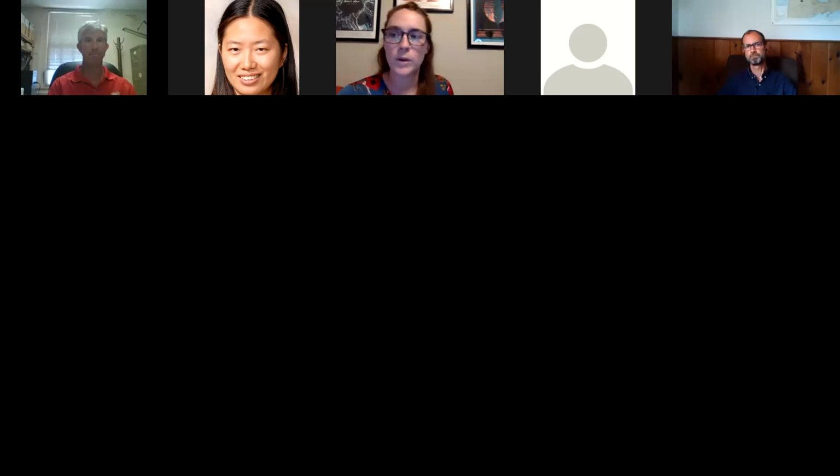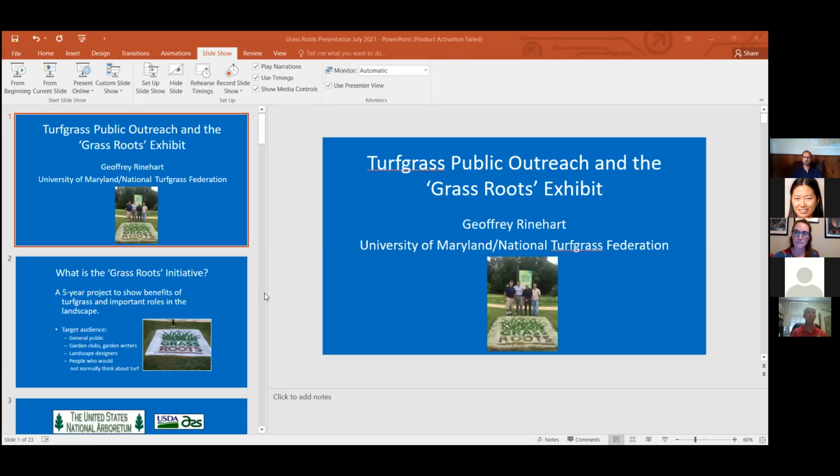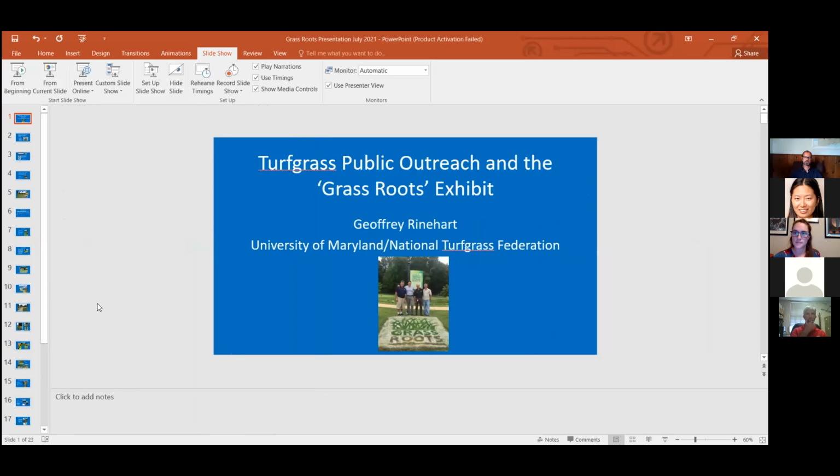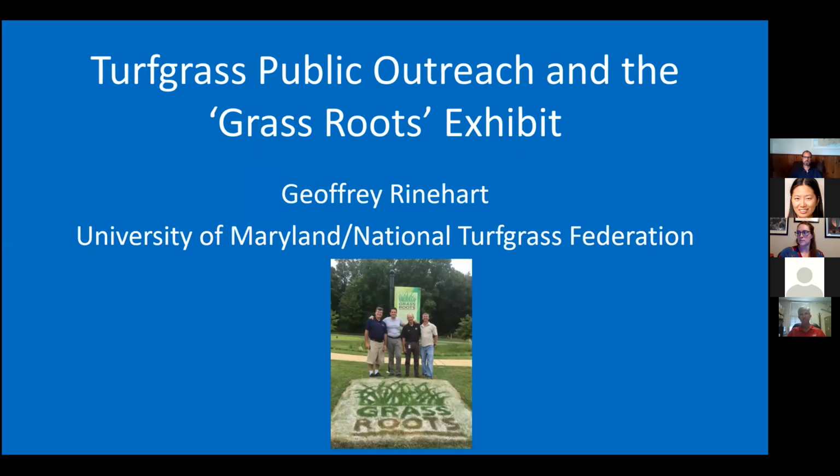Okay, Michael, we do have one question: what was the overall timeline for that rehabilitation of the mall? It was about 2 years. The first phase started in 2010 to be done by the end of 2012, to be ready for the 2013 inauguration. Then after that we started in 2014, 2015 in order to be done at the end of 2016, to be ready for the 2017 inauguration. So each one was a couple of years.